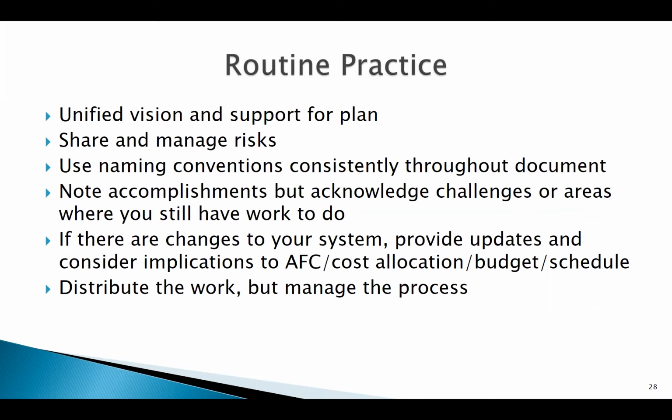If things change in your system, again, Nicole mentioned the as-needed updates, and we would be expecting updates. And we know that the automated function checklist and the ramifications to cost allocation is a new part of CCWIS. It's not new to CWIS, but it's new from CCWIS. So it's a new thing that we've all been adjusting to. So it's important when you are doing an update that you think to yourself, is this something that impacts my cost allocation? Or is this a change from my automated function checklist?